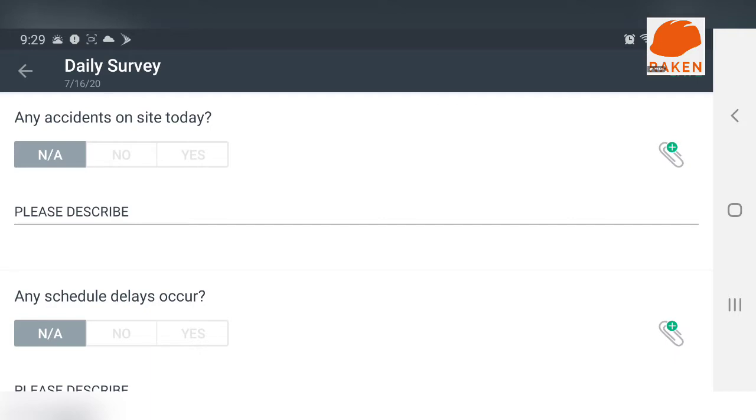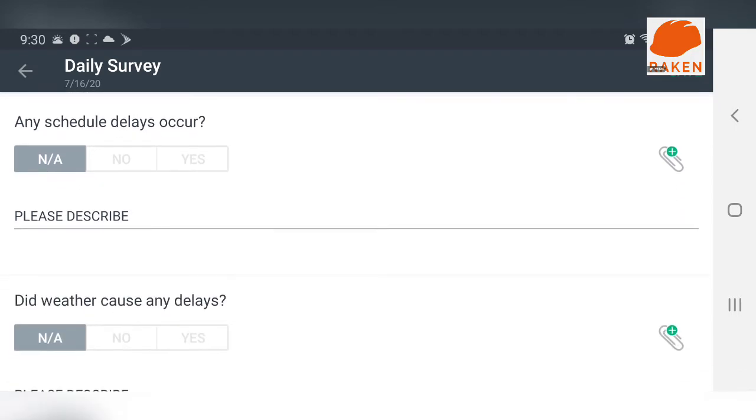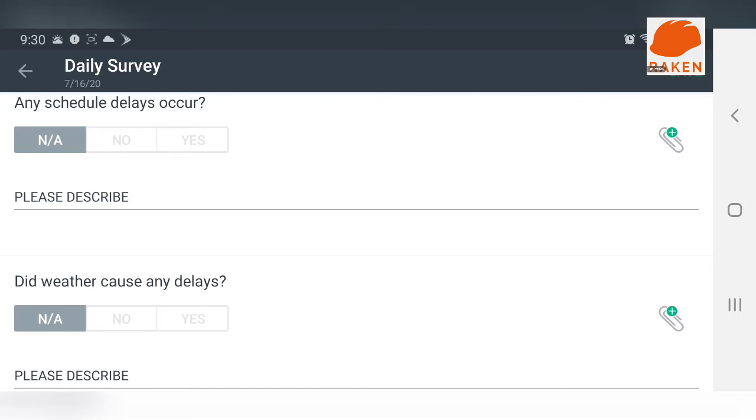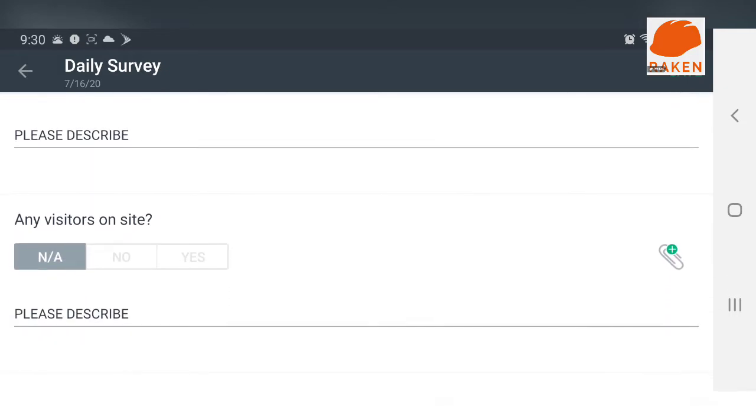And then they also let you do a survey. Now I do have my OSHA 30, so I do care about safety and security and stuff like that on the site because I want to make sure everything is locked up. So what I do is Raken has an option. So if any accidents on the site, you can write that down because you need that for your OSHA to write that and take pictures and you can turn your whole report in. Another thing is any scheduled delays. Sometimes there are delays and you need to let the customer know that there was delays because the truck was late today.